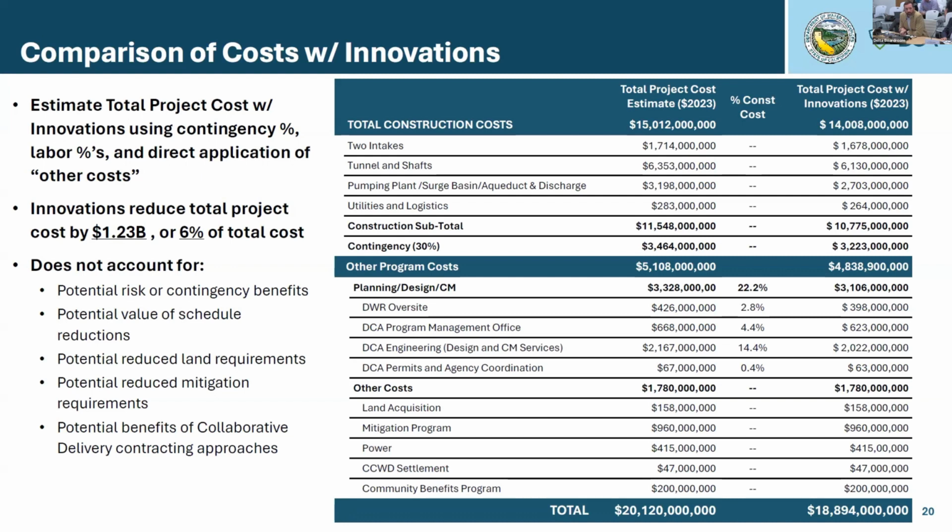And then lastly, as I mentioned at the beginning, this entire analysis assumes design, bid, build, procurement. So we're not even talking about potential benefits of collaborative delivery contracting approaches, which could further shorten the overall construction schedule.